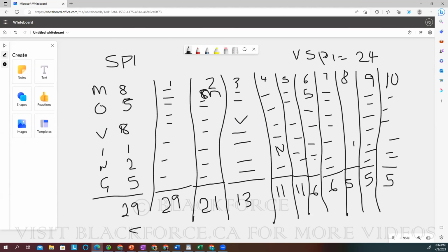We now say, okay, for sprint 2, we're taking another set of stories, right? So maybe when we're taking in another set of stories, we'll say, let's take in 25, because we know we're able to complete 24. But based on the priority, we wanted to take 25 because there is nothing we wanted to drop. We didn't finish this one because something came up. It's not like we didn't have capacity to do it. So let's say we took 25 in.